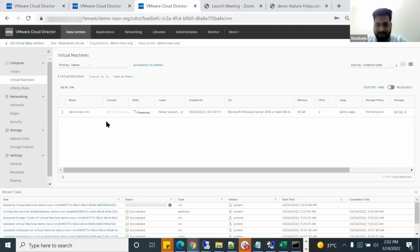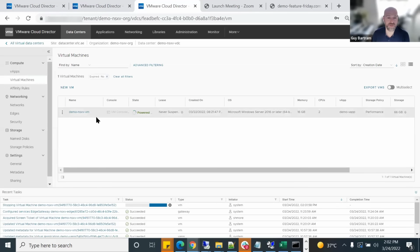Since the source is already available, we didn't delete the source VMs. They are just in a powered off state. So what we can do is power them on, and at the core level, we'll change the route. So this is another rollback plan for us in case there is any issue in the migration. Yeah, sure. You've always got the source there. Yeah.